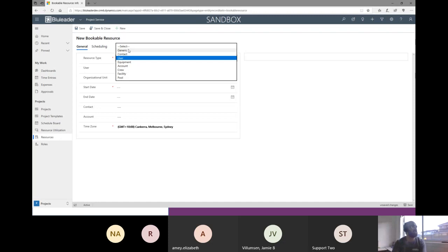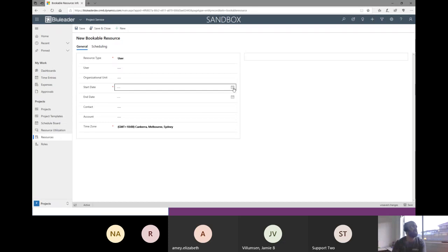So we can define all kinds of different resources. We can mention what is the start date, end date. If you mention this information, it will help you in scheduling, because if the resource start date is in the future and you want to engage them in your project now, the system will stop you from doing that. This is all intelligent, part of the system.